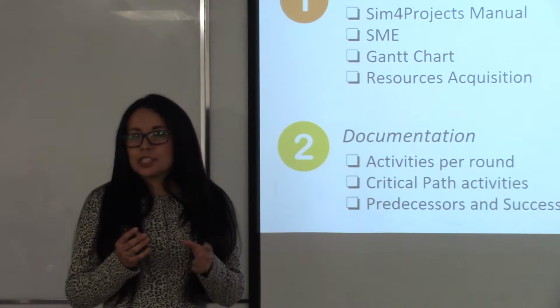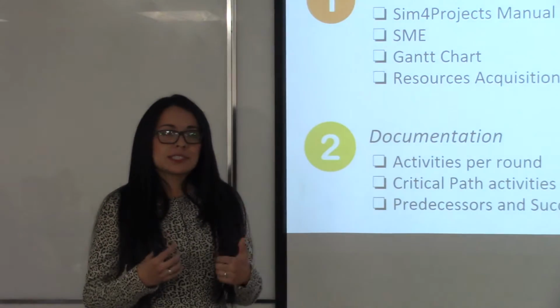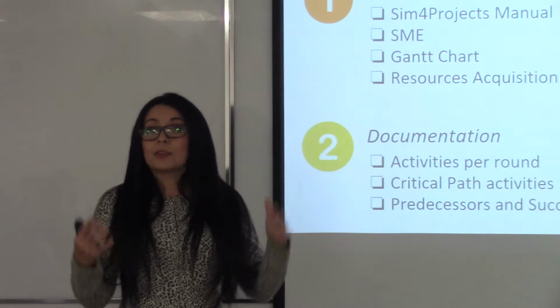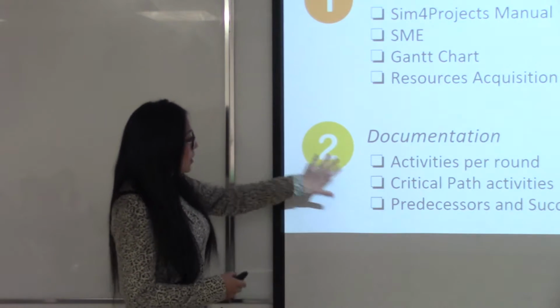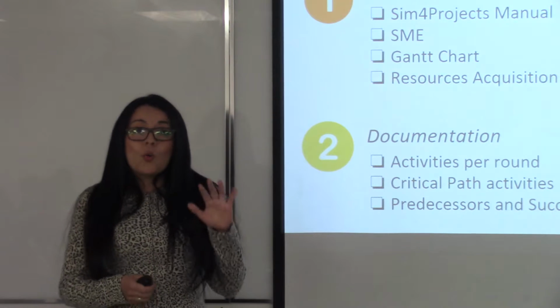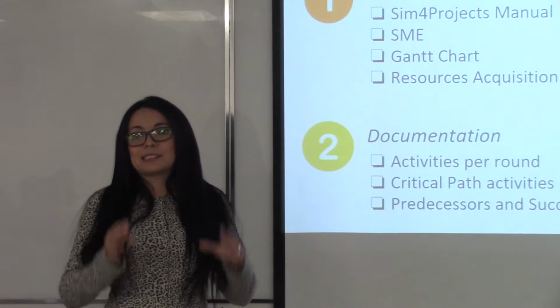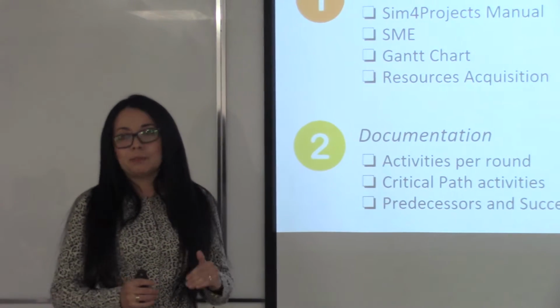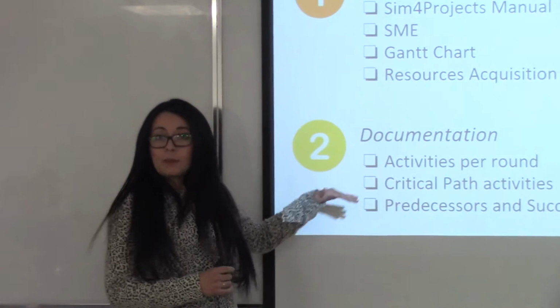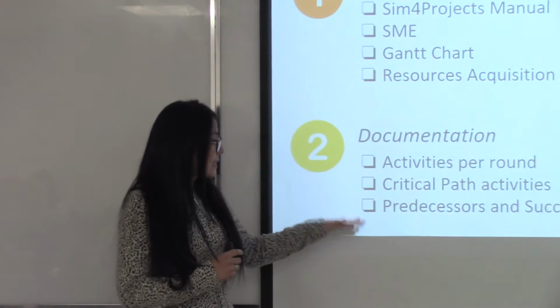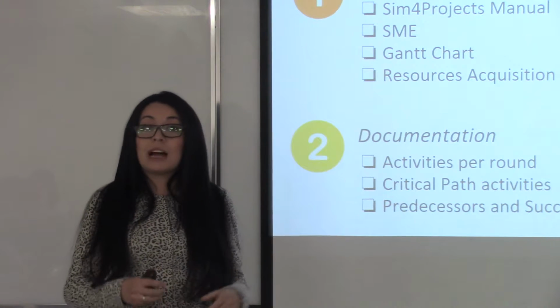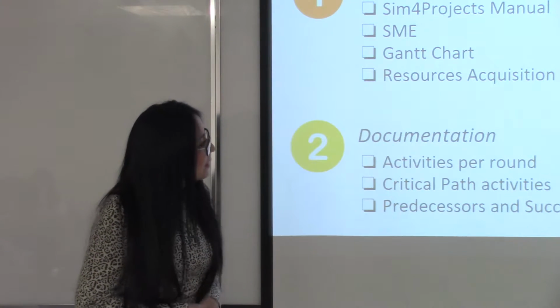However, this acquisition allowed us to get a deeper understanding about what the project was about since the beginning. Documentation: we had a perfectly organized file with every single activity per round. We highlight critical path activities and we link predecessors and successors to make sure about the allocation of resources.